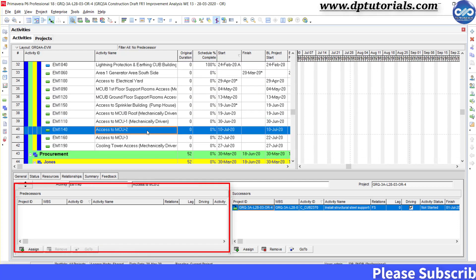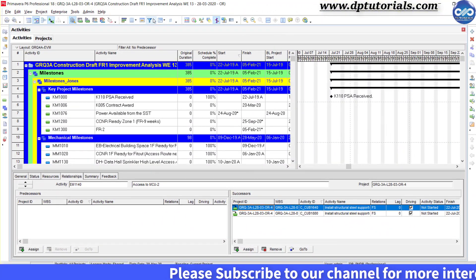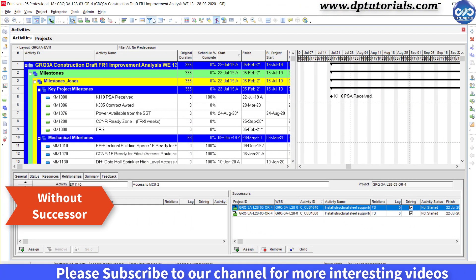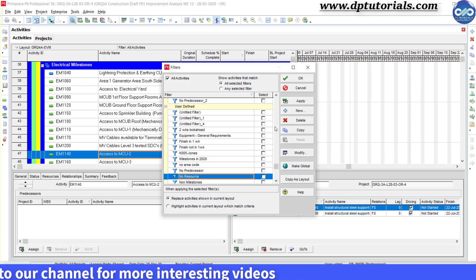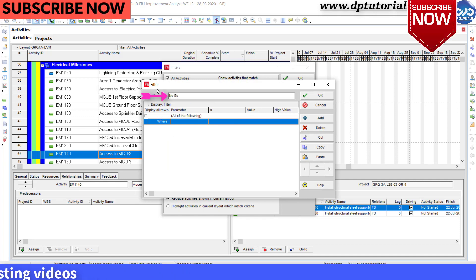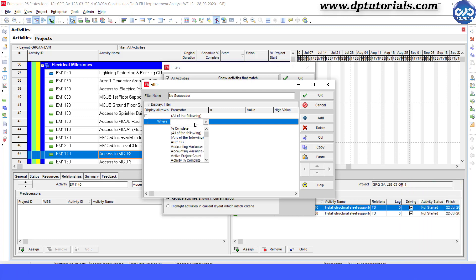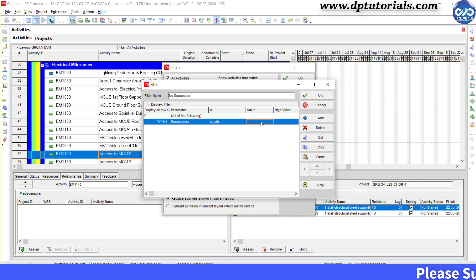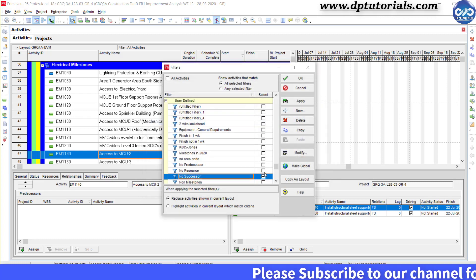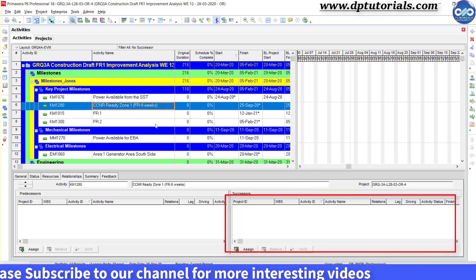You can cross check with the details section. Next, let us see how to filter all the activities without any successor. Similarly, click on New to add a new filter and name the filter as 'No Successor.' Give the filter criteria as: under Parameter, select Successor, condition as Equals, and leave the value as blank. Click OK, and click OK again. Now you can see all those activities without any successor.